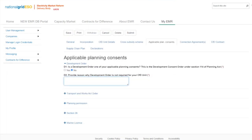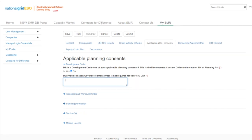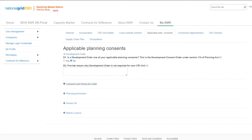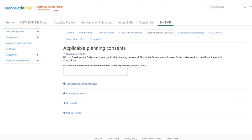This is the process which should be followed for each of the sections below. Moving to the next applicable planning consent questions with the Transport and Works Act Order in D9. The Transport and Works Act Order is only required if the applicant is an offshore wind project located in Welsh Waters. The tab will be unselectable if your project does not meet this criteria.